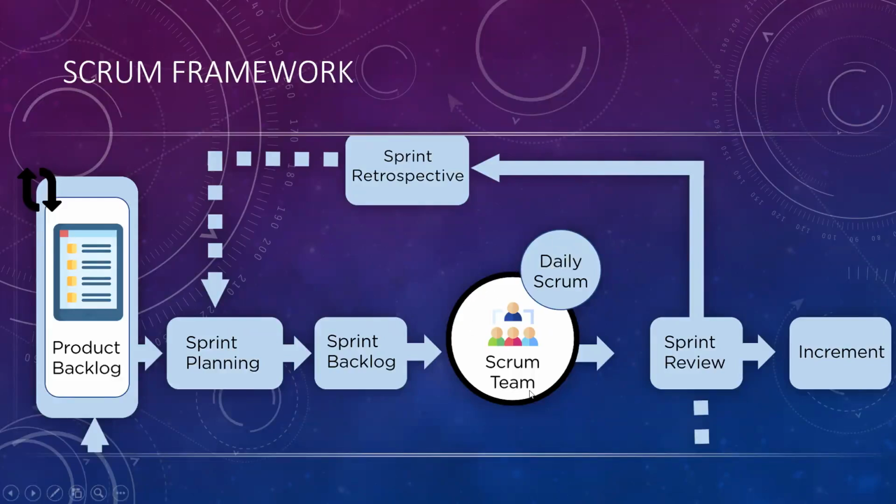This will be within the Scrum team. Who will be involved? The product owner and client would be optional, but the Scrum team members are mandatory, like the Scrum Master, development team, testing team, and the business analyst. They have to get involved in these daily Scrum meetings. After this, within the 2 to 4 weeks of the sprint, we are going to do the sprint reviews.